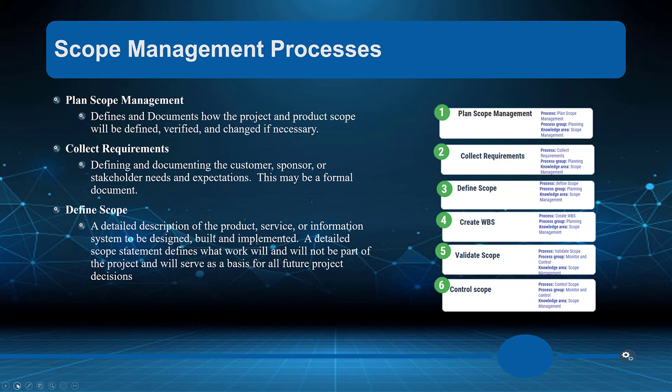The idea is breaking the entire scope down into scope packages that include the most minute process, feature, or functionality we want. When we say we want the functionality of a database, that means breaking it down into tables and processes the database will incorporate. We collect requirements from the customer, sponsor, and stakeholders — the more we plan, the better we'll execute, because jumping straight into the project is where scope creep comes from.